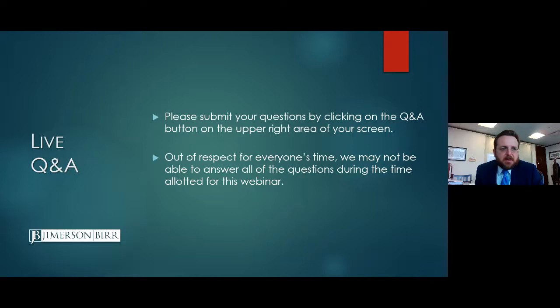And then last, if you find yourself stuck with the GC's contract terms, you can at least minimize your risk by reading your subcontract, identifying what those key risks are in the terms, and making what I call a cheat sheet. Maybe it's just a one-pager of all the key things your team needs to know about the contract, and you educate your team on that.